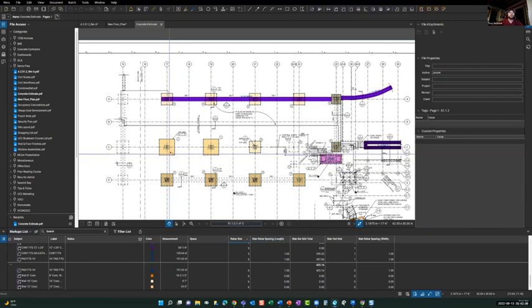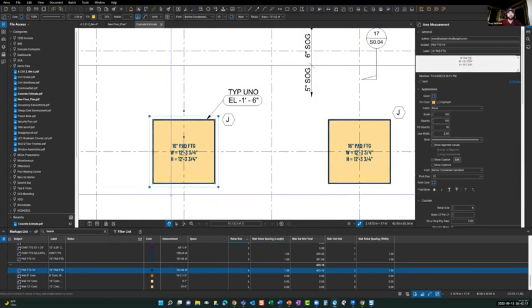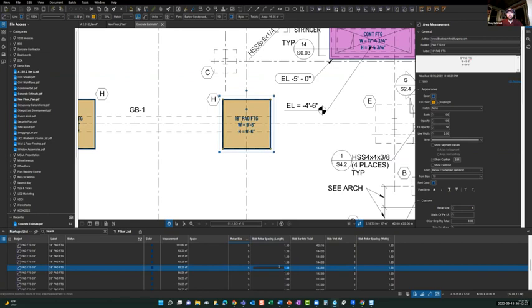Okay, so if I look at this particular isolated footing, I can go in according to the foundation legend. I'm going to put number 6s in there. Maybe they're number 5s this time. The spacing in the length direction is, let's say, 1 foot on center. And in the other direction, let's say it's 16 inches. So we'll leave that at 1 1/3 feet.